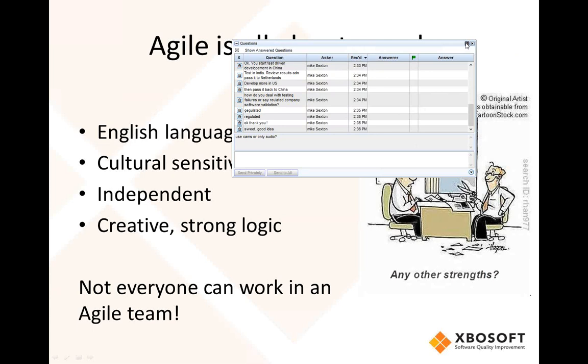Another very important thing with an Agile team is that someone can work independently. Like I mentioned on the slide, a day in the life of an Agile tester in China. I don't actually sit in between the tester and the work that has to be done. I don't distribute the work amongst different testers. They have to pick up the task by themselves. All the different tasks are prioritized in TFS, so they pick up the first task that they can, they assign it to themselves and they start working on it, and the moment they're finished they're going to pick up the next one.